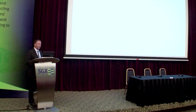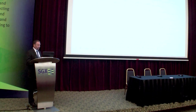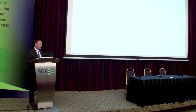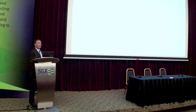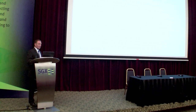A lot of feasibility studies coming out are often done by modifying factors rather than actual work. The institutes will have varying data and information from similar projects, particularly on the processing side — that a project of this size with this particular deposit at this milling rate will produce X with X solution — and they'll apply that to the project in the feasibility stage without actually doing the work. That's something very dangerous in terms of the outturn, because the processing side of the business is very, very complex.